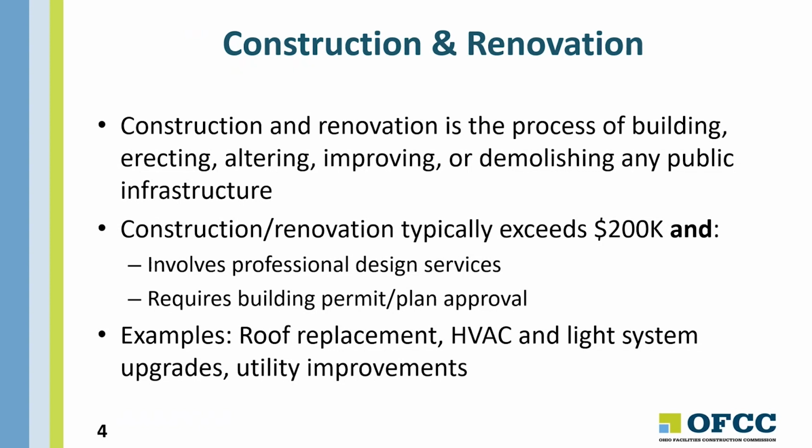And when Chapter 153 is required to be followed, and 153 deals with construction and renovation. Construction renovation typically exceeds 200,000, or if it involves professional design services or requires plan approval from the Department of Commerce.